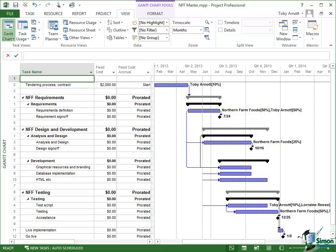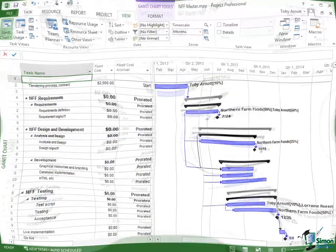So I go away. I look at the last website development project we did, how much more complex this one is, but on the other hand how much more we've learned. And I come up with some figures and say, based on past experience and what I think is involved here, I think we're going to need about 900 hours of our own time in-house work. So that's roughly 100 days, a bit over 100 days of work for internal resources. And I'd say probably about the same amount of time from external resources, say about 900 hours of external resources, consultants, web developers, and so on.